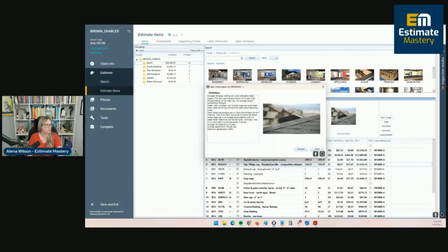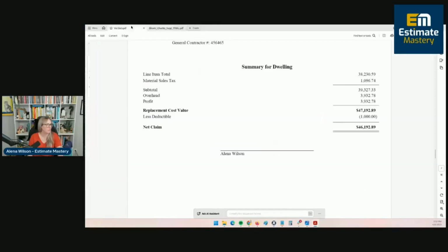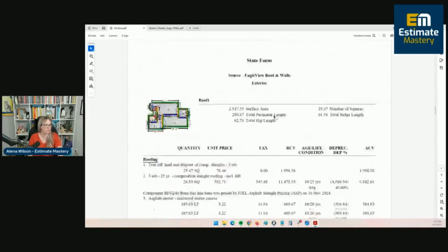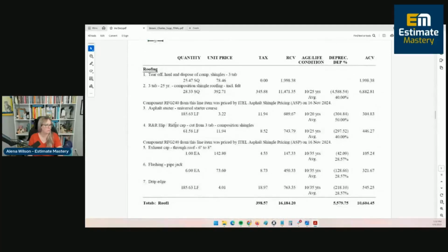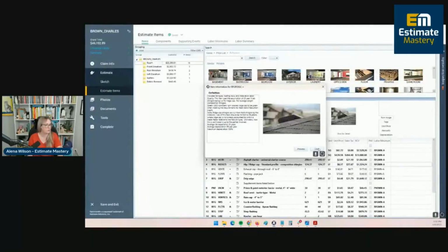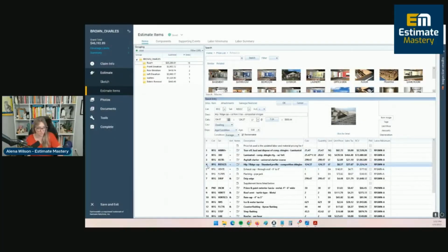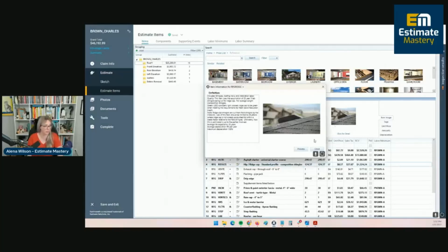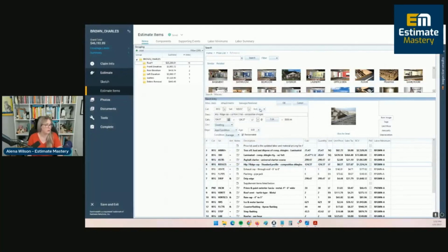Shingle roofing nails. Let me look at one other thing. Cut from 3. Aha, they included the removal is what happened. Ours only included the replacement. Okay, so here's a really good example of playing by Xactimate rules. The original adjuster paid for the R&R of the ridge cap, and we can go back and add the RIDGCS, and that will account for that.